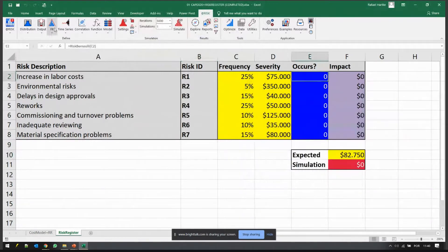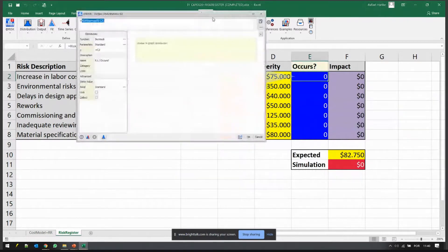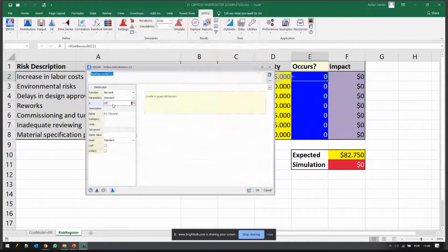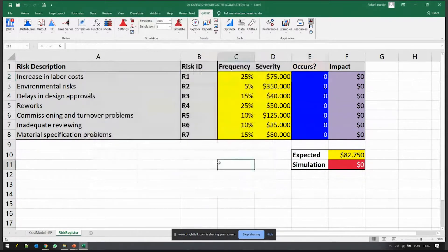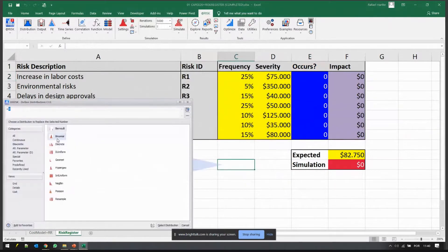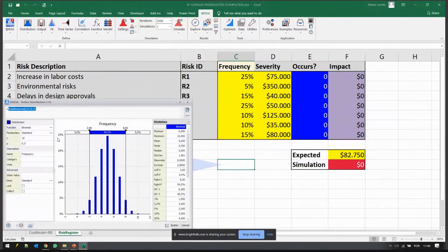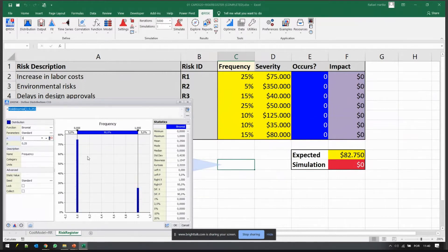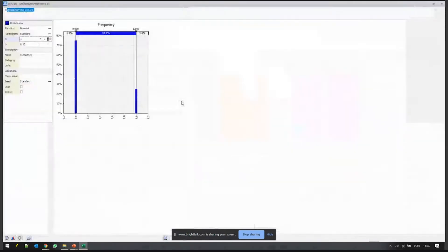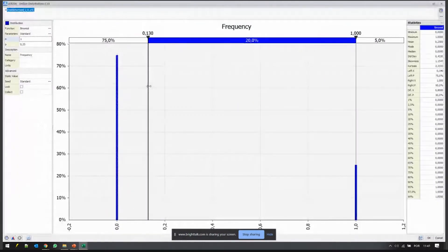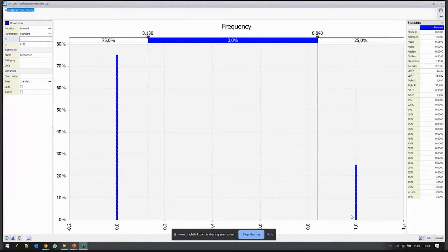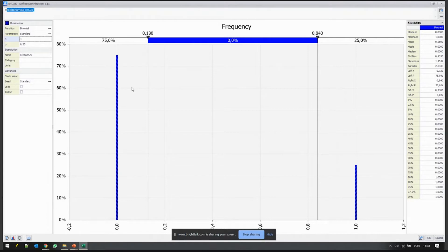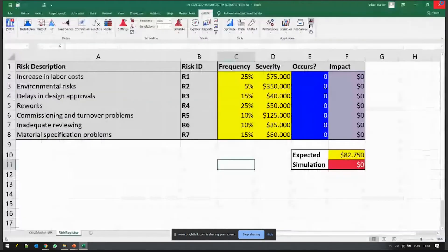I'm using the Bernoulli distribution to assign a 25% likelihood of this risk occurring. Binomial one and probability 0.25, so I'm assigning a probability of 25% of a risk happening or not, which means there's a column of 25% on top of zero - the event happens, true, yes, one happens - or 75% chances, zero, no, false, event does not happen.